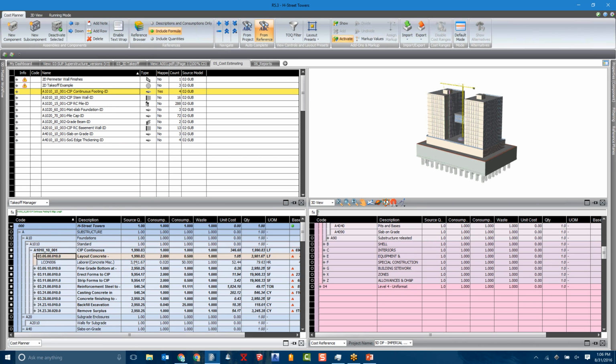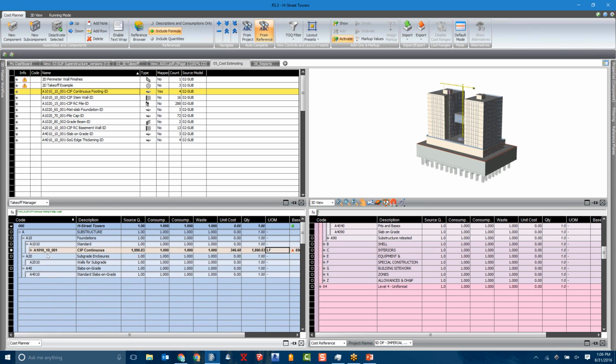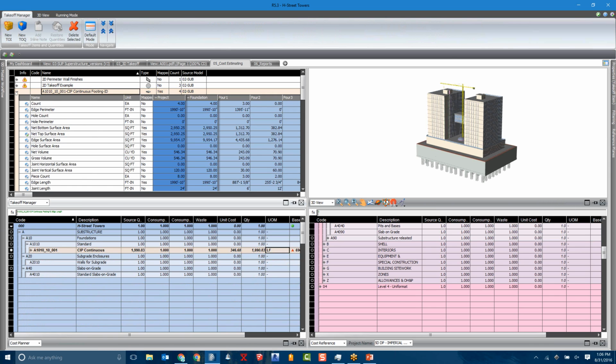And as we can see, from one quantity, we can derive other quantities. So the source quantity here is our 3,981, which has derived 79 hours. So we can derive hours, material from a source quantity. And when I say source quantity, I mean from our construction caliber quantity.